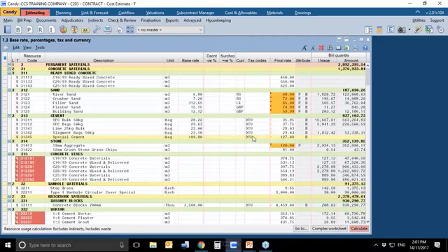And why do I show you this example? The reason is the order in which you allocate these codes could have an impact on your final rate. Example, instead of applying the tax codes in this sequence, if you applied it as D, which is your customs duty, and then your local tax, and then clearance, you would notice that your final rate changes.